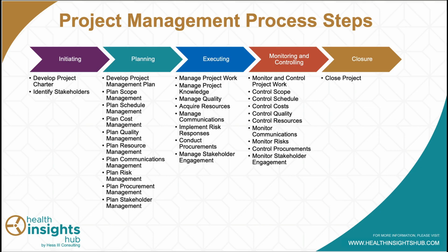So from a high level, in the initiation phase, we're going to be focusing on starting a project charter, which is a high-level summary of what you are proposing to undertake. We're also going to be identifying key stakeholders. Those can be internal parties or external parties that have invested interest in your project, and they can be for or against. And we'll talk about that in a lot of detail today. And then we're going to move into the planning phase.